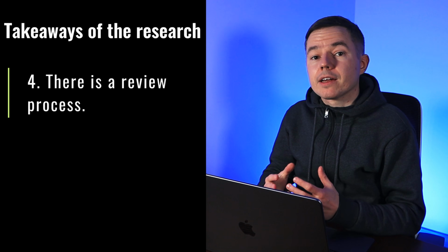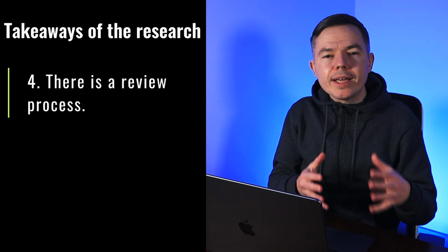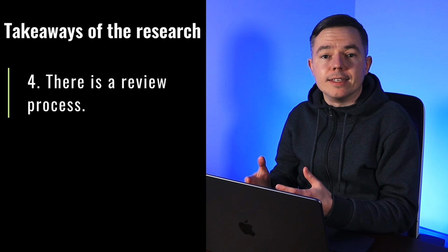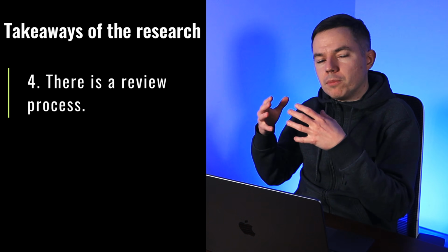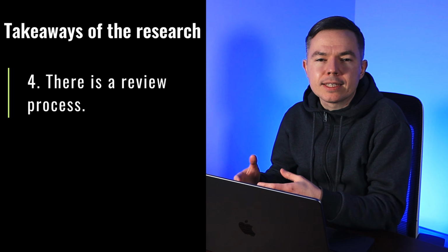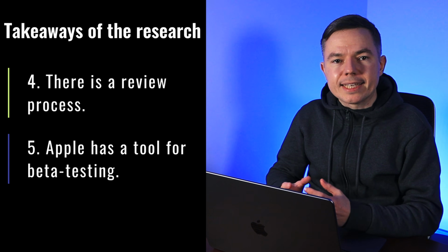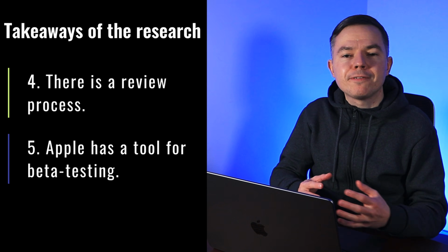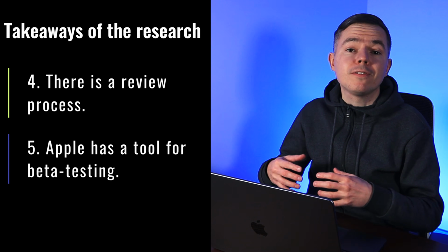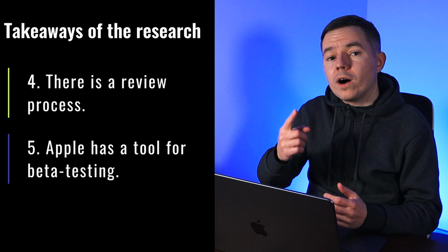Fourth, there is a review process. You can pass it quickly if you follow the guidelines, so it makes sense to invest more time into the requirements and quality assurance. Fifth, Apple has a tool for beta testing, so it might be handy for our clients as they will develop the product, not just one version of the application. Okay, that's only the technical side of the project.